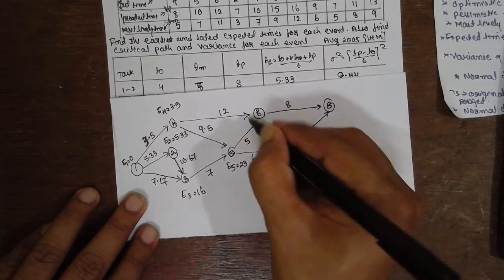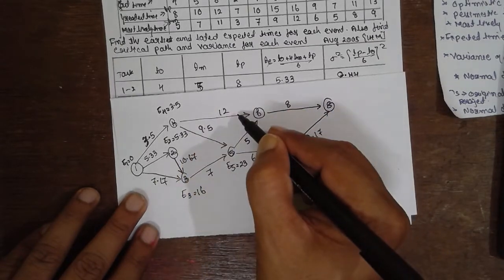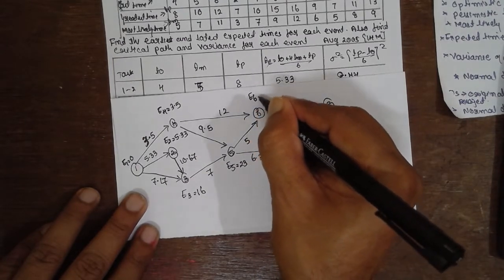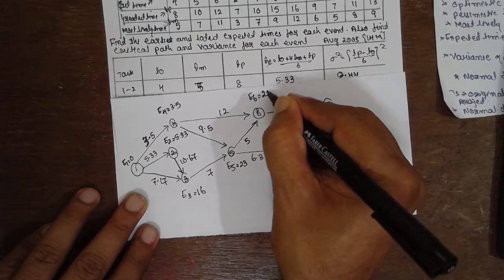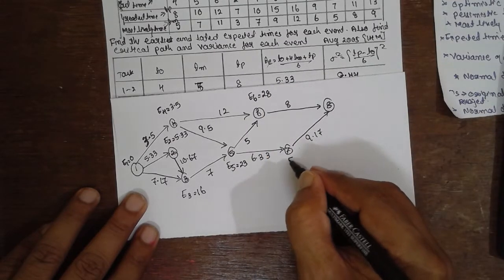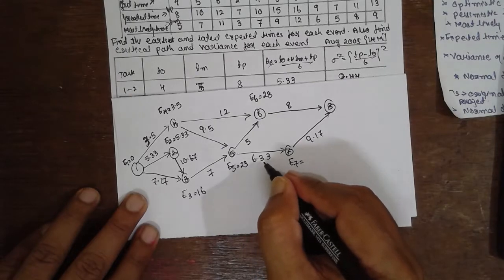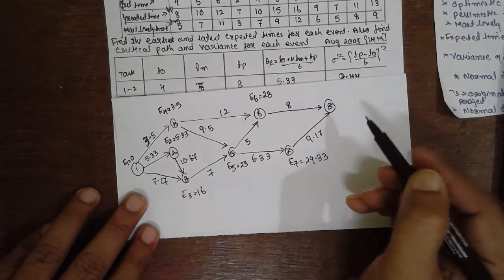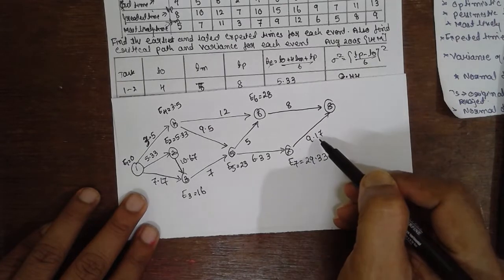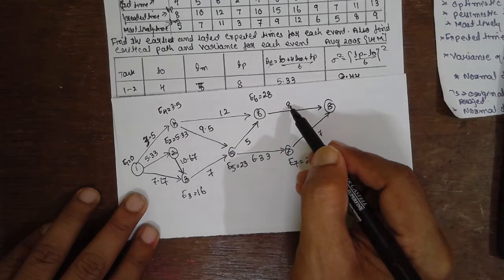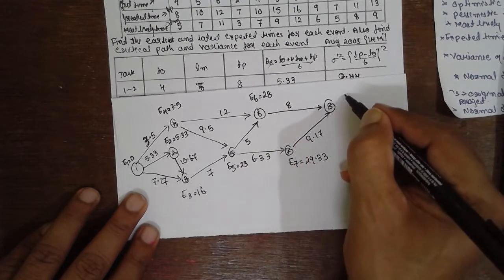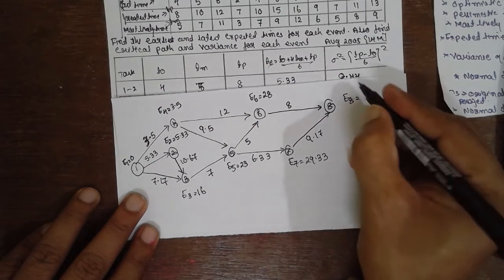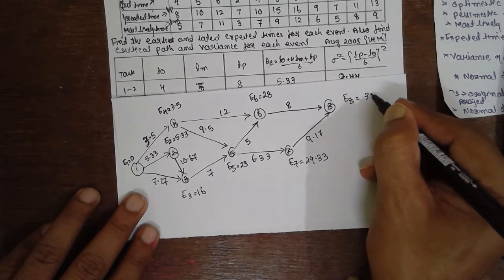For E6, there is a junction: 3.5 + 12 = 15.5 or 23 + 5 = 28 — select larger, so E6 = 28. E7 has no junction: 23 + 6.33 = 29.33. For E8: 29.33 + 9.17 = 38.5 or 28 + 8 — select larger, so E8 = 38.5. When moving left to right, always select the larger value.